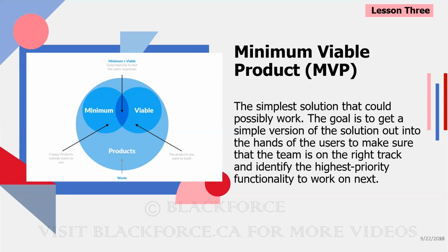How do you determine the functionality that will go in there? Like I said, the must-have, the high priority functionality is what you want to build first. How would you determine the high priority functionality? By talking to the business. If you have a conversation with them and they say, oh, we have these 20 user stories and they're all so important, and if you don't deliver them, we're all going to not be able to work and all of that. And then you tell them something along these lines, not in my exact words, right? To say, if we had time to deliver only 10 of the 20, can you tell me the 10?